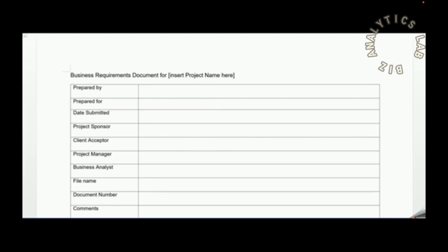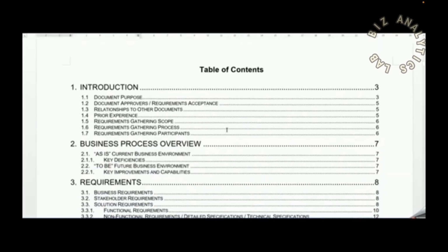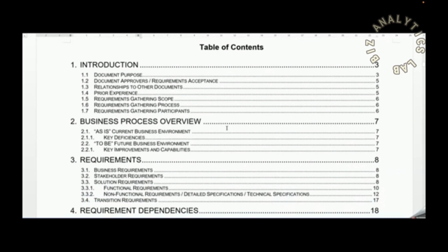So the business requirements document is a major deliverable representing the achievement of the business analysis milestone in a project management. So it requires formal review and sign-off by the client acceptor or whoever is going to provide a sign-off. Who is going to represent the interests of the business area stakeholders under normal circumstances? The business requirements document is created by the senior business analyst who is delegated to a project. So the business requirements document template conforms to some of the best practices and is the primary tool for structuring requirements.